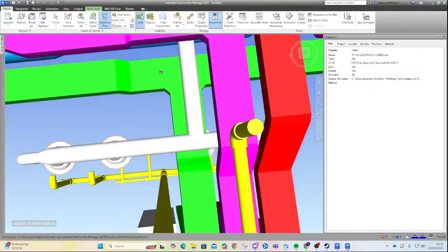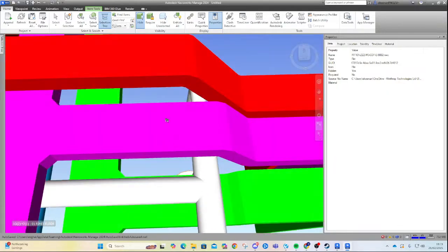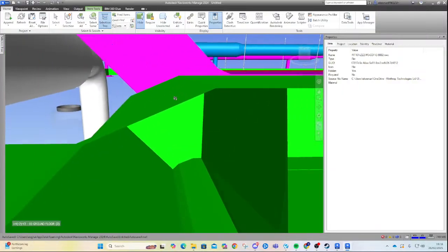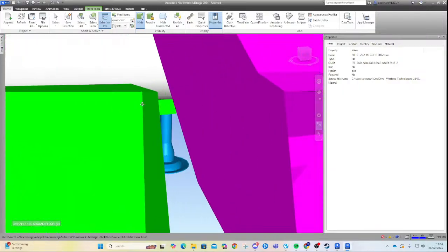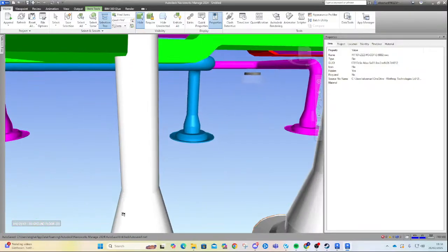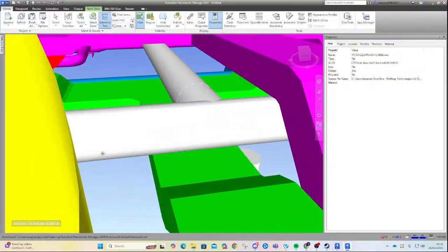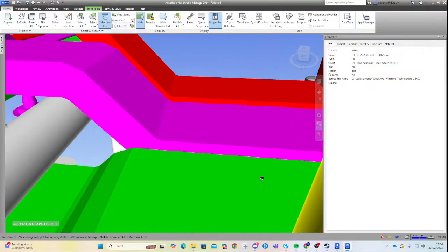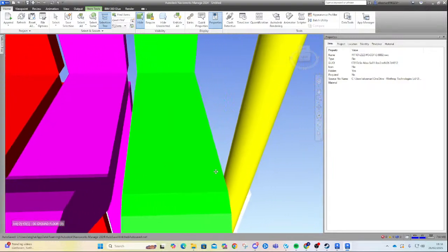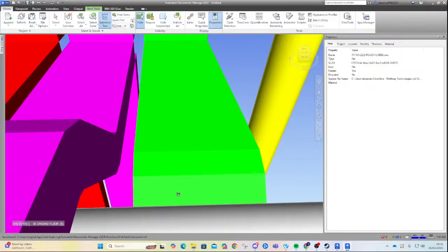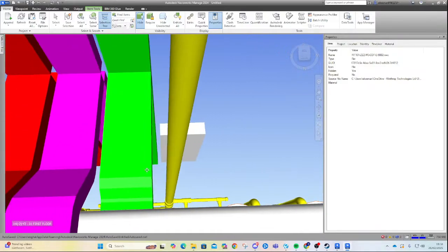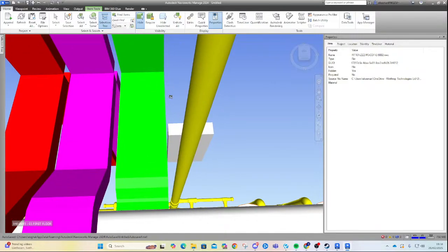So this is actually right at the side. Okay. So this is something that we didn't notice. Well, I missed because this pipe comes up. So that duct does. So really to solve this clash, we just have to increase the space between here and here and just tighten up there and we should miss it. So it's a relatively easy clash to solve because we just have to pull this across.